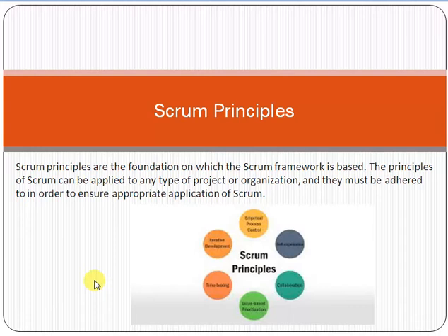If we use the Scrum framework here, friend, we use the sprint based approach. A sprint is a 3 to 4 week time period. So we can say we use 4 sprints, and each sprint contains 10 tasks. First we plan, develop, test and deploy 10 tasks, then the next 10 tasks, then the next 10 tasks, and then the next 10 tasks for sprint 4. So till we reach sprint 4, we complete all the tasks.